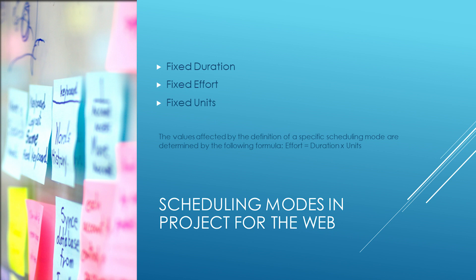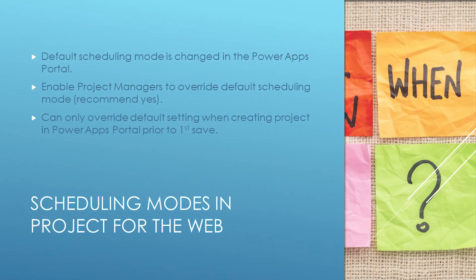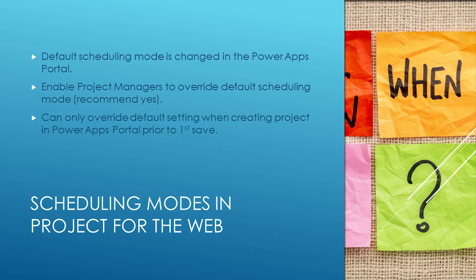Units is the number of resources or the amount of hours the resource will work per day. These three items work in tandem together. The equation is: Effort equals Duration times Units. That can be one resource, two resources, or the specified number of days they can work.